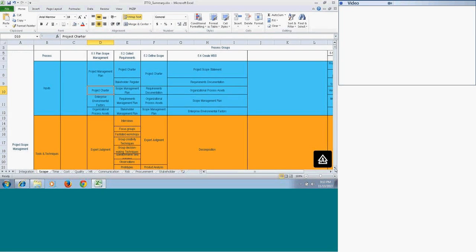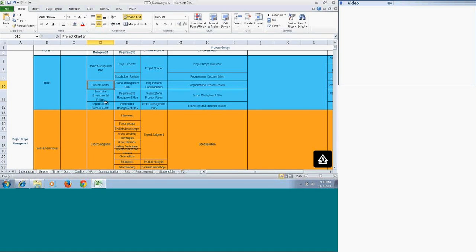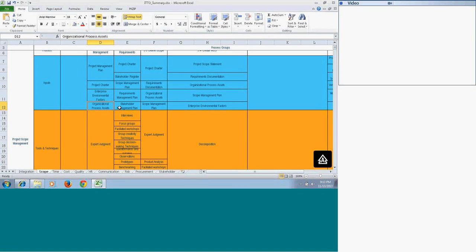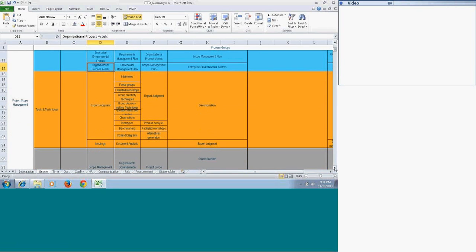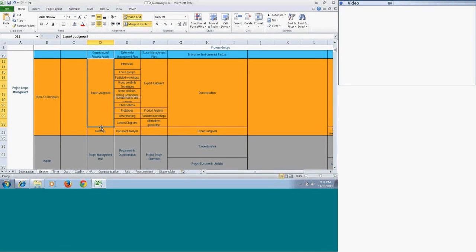The next input is the project charter — you will have some high-level requirements on the project charter, so this is one of the inputs needed for preparing Plan Scope Management. Then we have enterprise environmental factors and organizational process assets. Enterprise environmental factors are the factors that your organization operates in — it might be a matrix organization or there could be some government rules and regulations. Organizational process assets are the assets created from lessons learned from other projects.